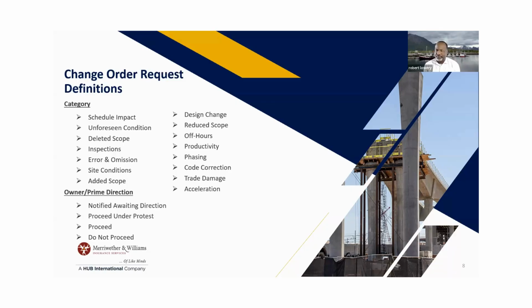They could not open up this building without these products in, but it had nothing to do with us. So if there's any delay on the owner side or on the GC side, you have to document that too, because they're going to come and try to charge you for it when it had nothing to do with us. Yes, you're right, especially if any products are coming from Europe. Summertime, you're right, 6 weeks they're shut down. You have to remember that, because I remember going to Germany to validate equipment, and I went in summer, and they said, hey, the factory's not open. Right.